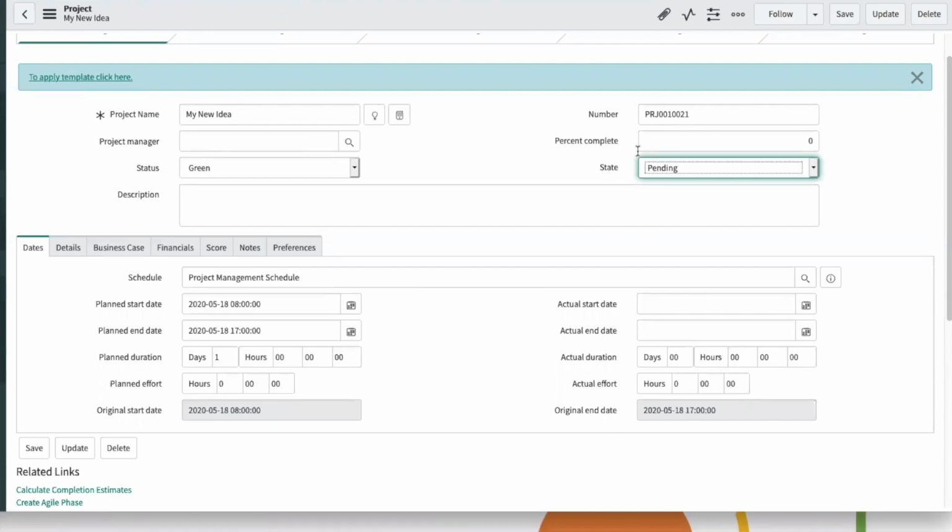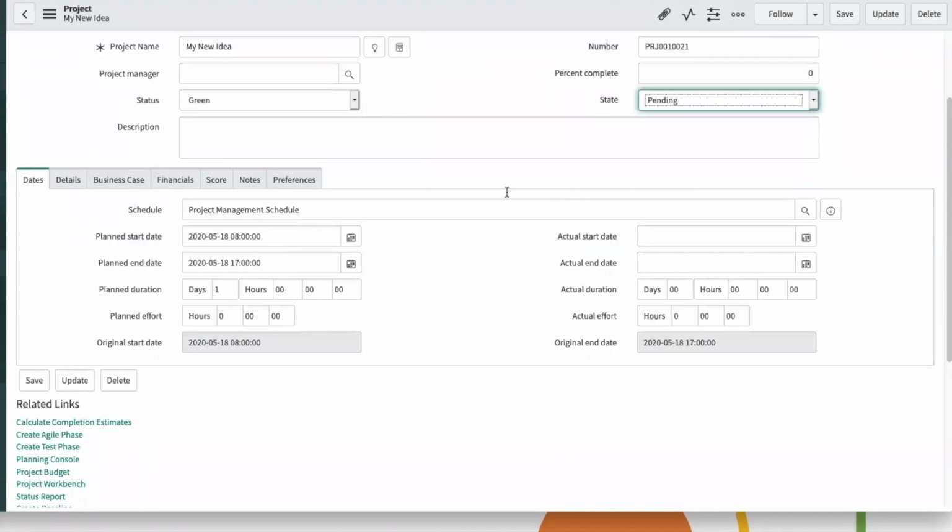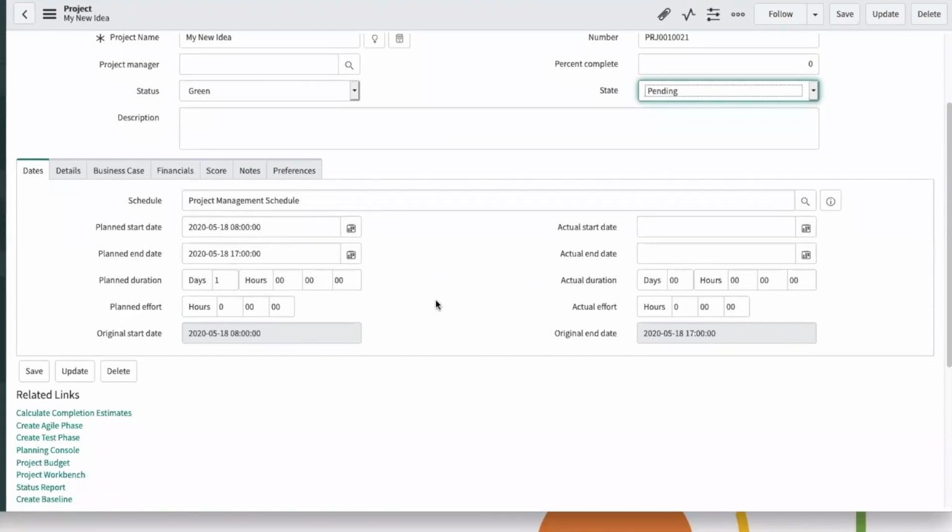Again, it's just not a recommended field to really screw with on the project form. Also, what I tend to find too is there are too many date fields down here. You can see there are like 6 separate areas for them to collect dates. And typically, you can see these are read only. They're created basically at the project. The project was created for a day. When you create a project, it just schedules it for one day, right? So you'd have to come in and adjust the time frame on it.